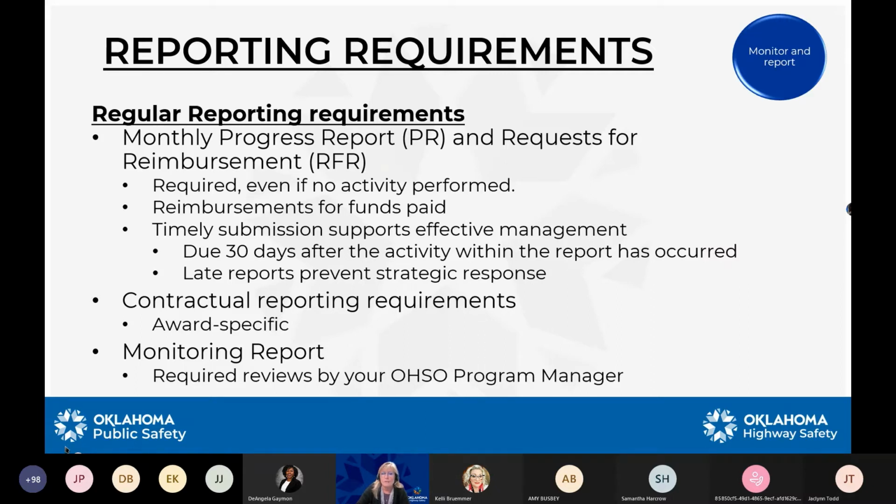Each month, you're required to submit a progress report and request for reimbursement. The reporting period can be calendar month or fiscal cycle. Either way, 12 reports are required, including when circumstances lead to no activity for a particular reporting period. I want to emphasize these reports are required even if no activity is performed.